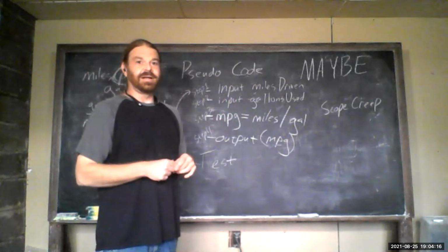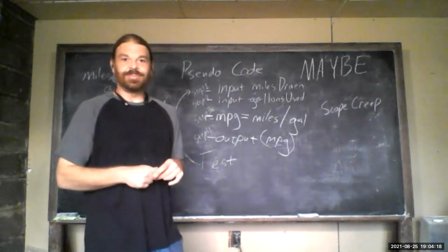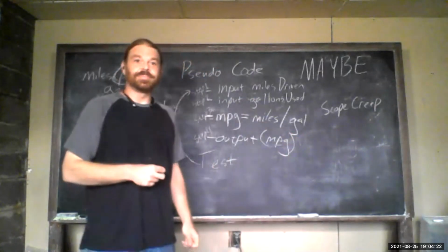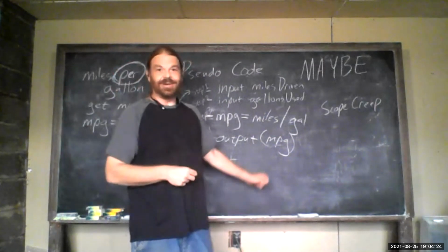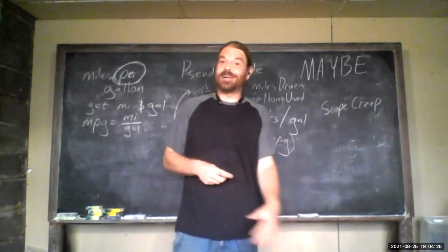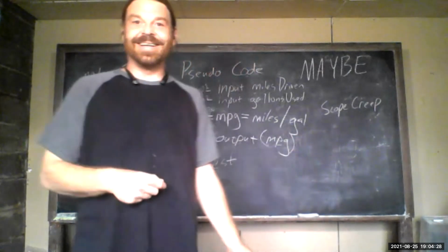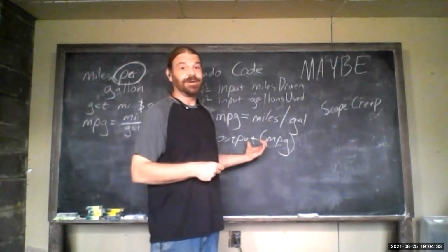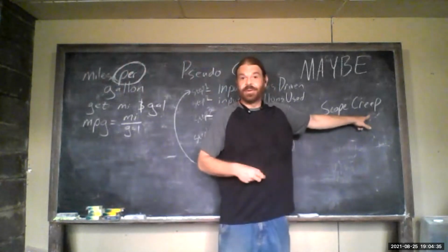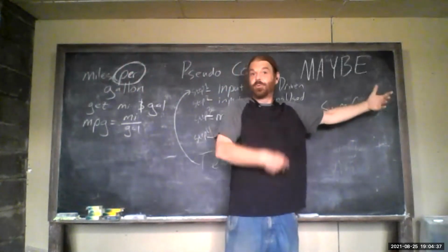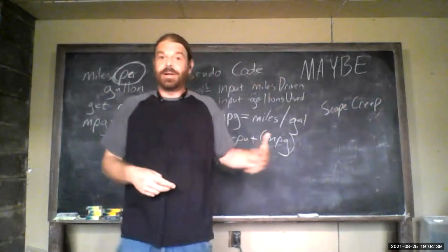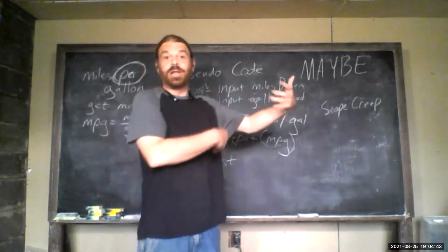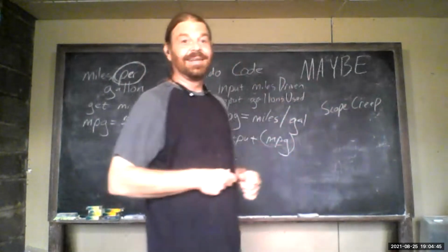And then before we get finished coding it, the customer has another idea. They're like, oh, is there a way you can work in like shopping around for different gas prices? Like some way to tell what the best price is? And there's another feature that they want in their piece of software. And that's scope creep. Because as more and more demands come up, we can't ever get the thing finished because the customer keeps wanting more and more things added in.